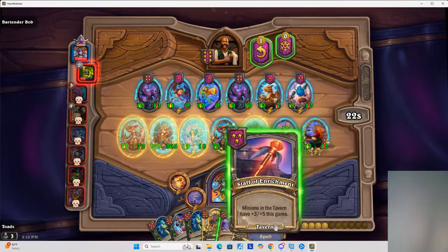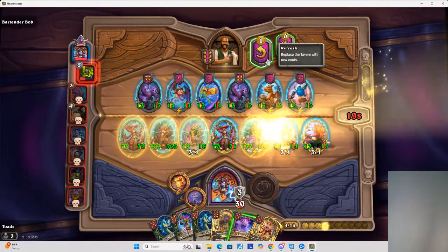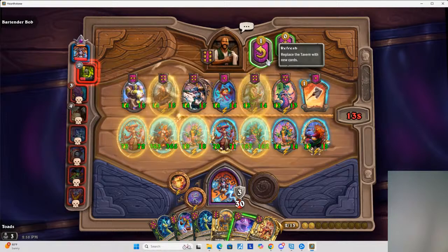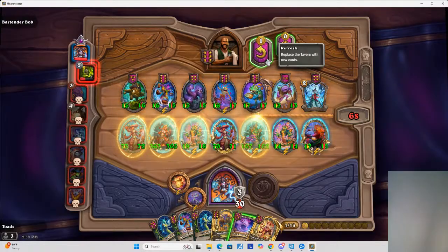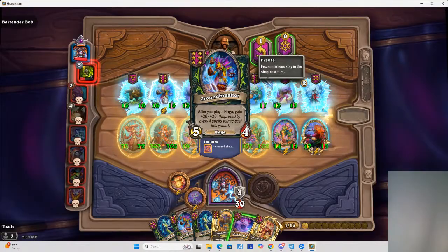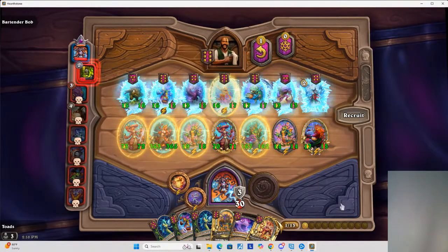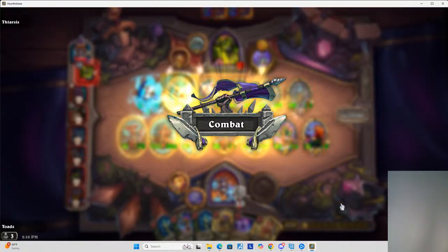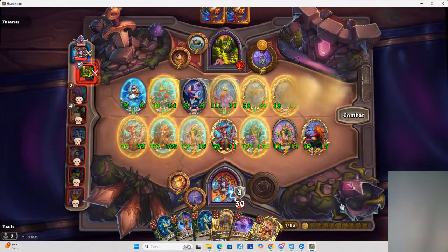And finally, the owner can approve the build out. With the construction tasks in order, we can start on the technology tasks. First, we need to negotiate and sign the IT contract. Then the IT consultant can work on the network plan, phone plan, and software plan. After those plans are approved, the consultant can install and configure the network, followed by the phone system and then the business software. After the systems are in place, the owner approves the systems.